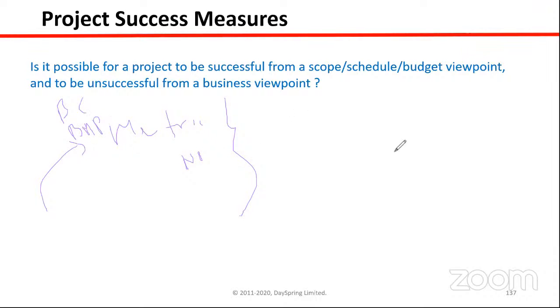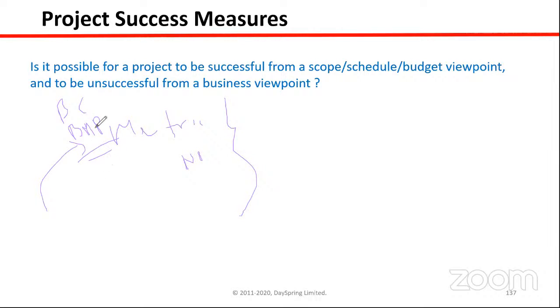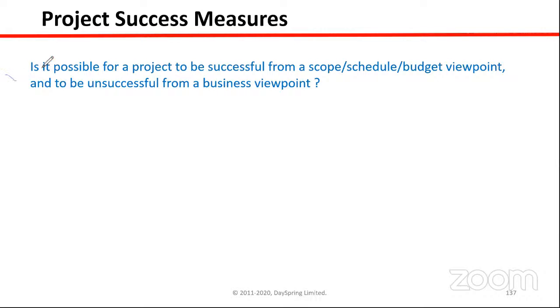Yeah. So when the project is completed, even in the benefit management plan, not always after finishing the project will you get the benefit. In some projects, you may get benefit in different phases of the project. And that will be mentioned here in the benefit management plan. So if you can show at evaluation time that you have achieved what is mentioned in the benefit management plan, then the project will be successful. So we have to compare. Yes, you have to evaluate and compare.